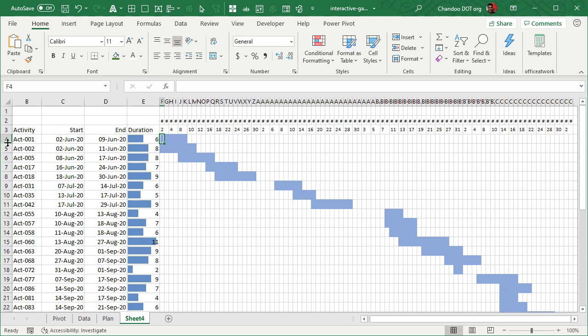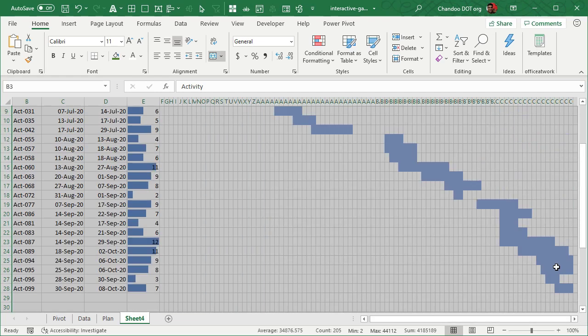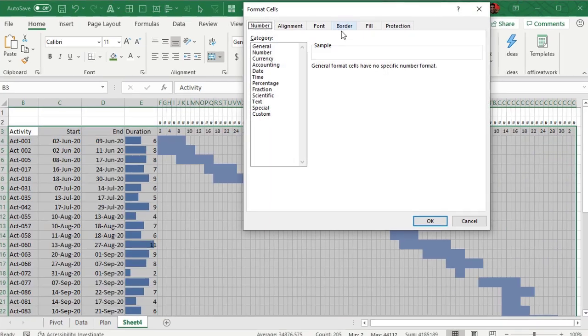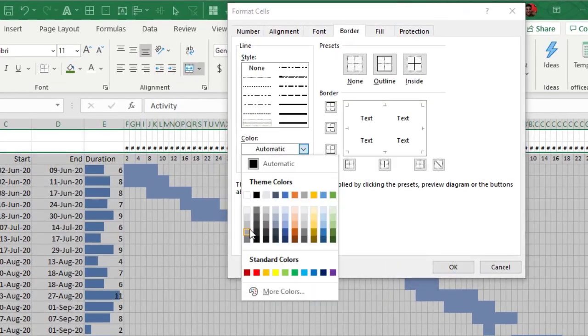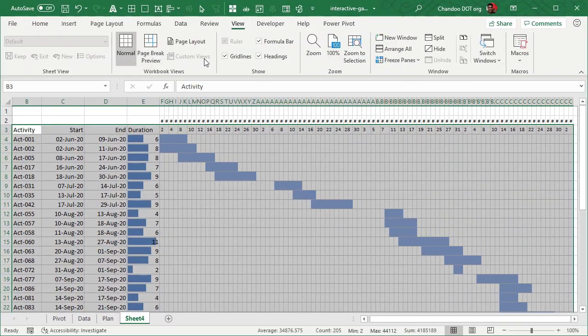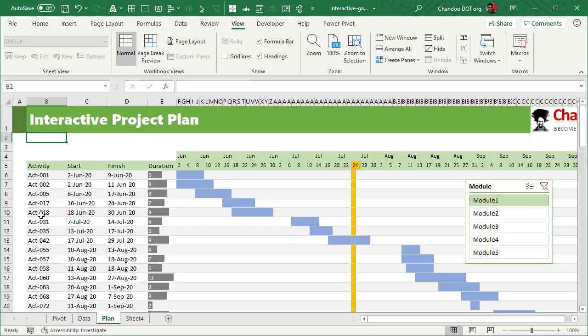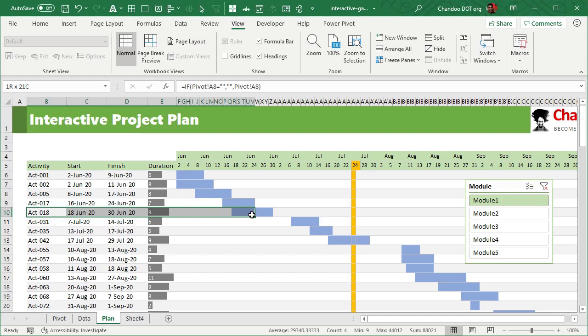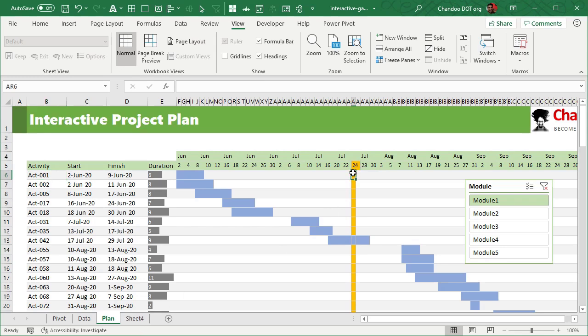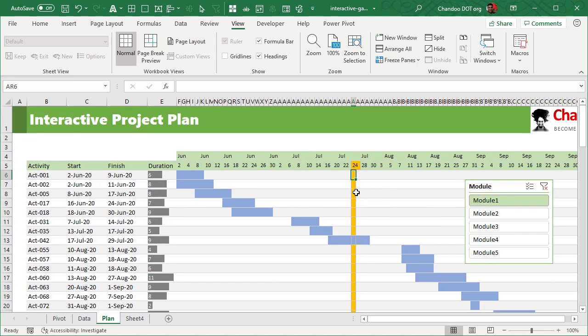You can add a bit more cosmetic things around it. For example, you can go and select everything and then apply borders around the cells. For example, I normally don't put borders around everything. I just put borders in the horizontal direction. And when you disable the grid lines, then it will be easier to kind of follow through and read. Another good idea is to highlight every other row in a dull color. This is called zebra lining. And you can add another conditional formatting on top to basically check the row number and whether if the row number is even then highlight it. And then once that is done, you can also add additional rule to check if the current column has today's date. If so, highlight that column in a different color. This way, you know where we are currently and what happened before and after.